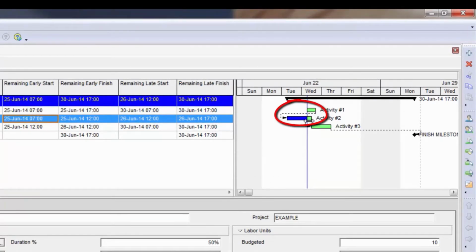A lot of people like to use it that way. They figure, well, if we're running out of sequence like that, we can run them in parallel. The argument against using progress override is that the activities are now in parallel, and if they were using the same resource, now you may have a resource overload. If you're using the leveling functionality, it would override that and actually correct the resource overload in most cases.